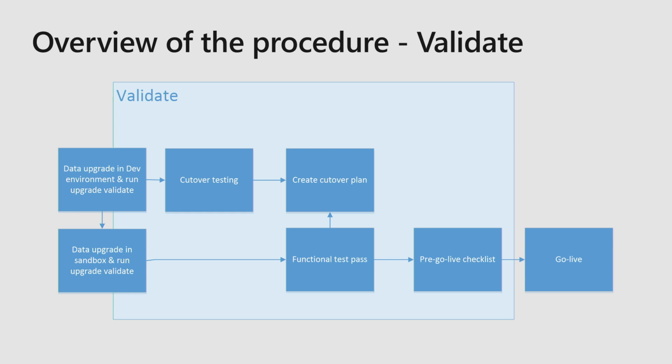In addition to that, you also start doing the UI and functional validation in your sandbox. Is the data there? Is it working? Are there additional parameters now in 365 that we didn't have, maybe around India localizations, GST, all of those different things that we've added that aren't in 2012, that you actually need to enable before you can use the product? So you start to come up with a functional set of steps that need to be performed, and ultimately that gives you your cutover checklist.